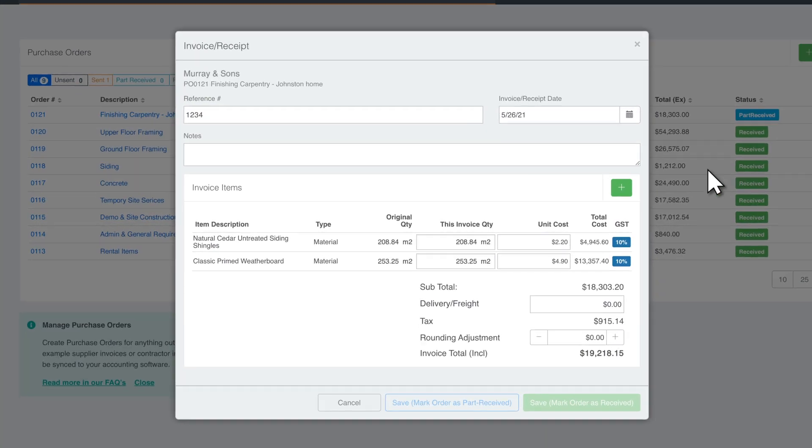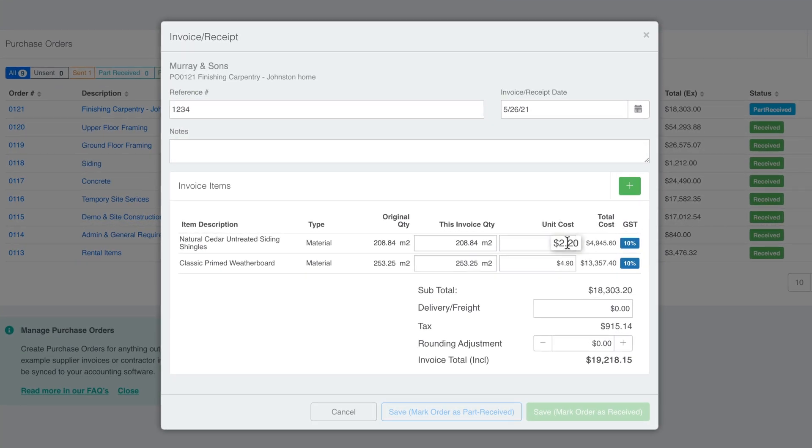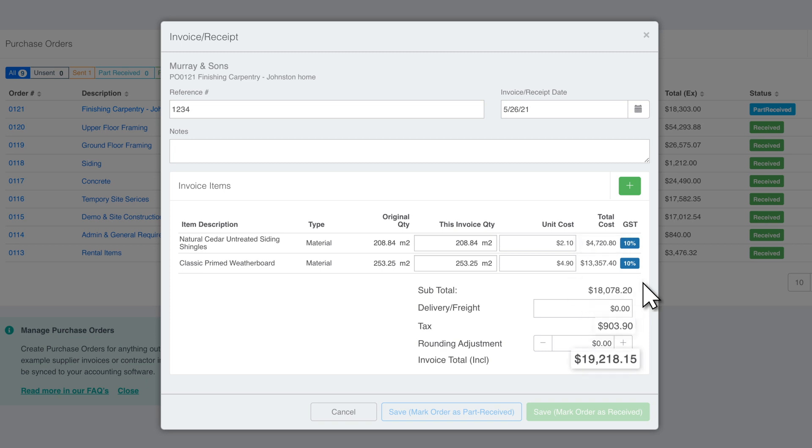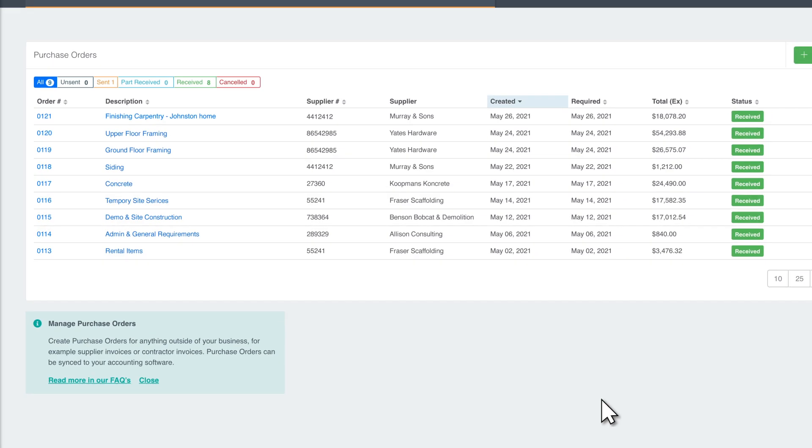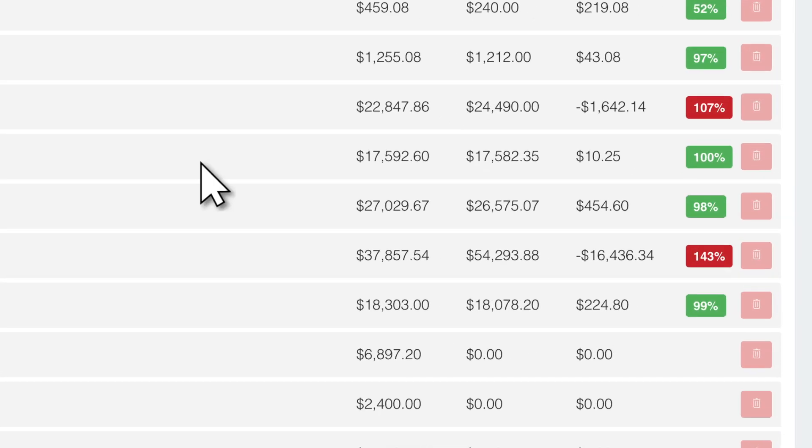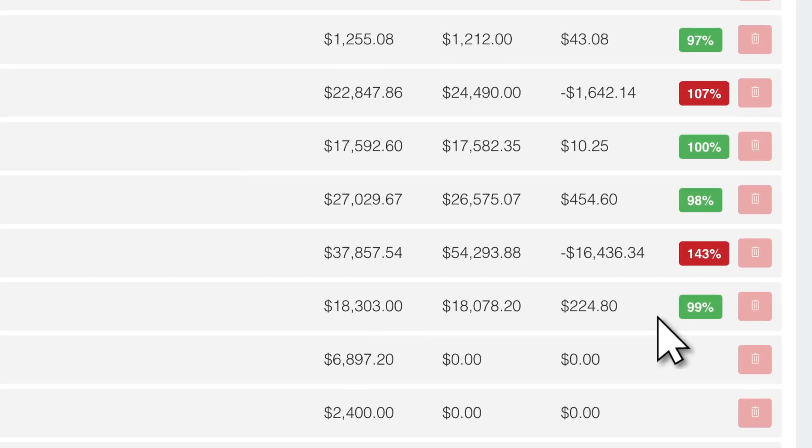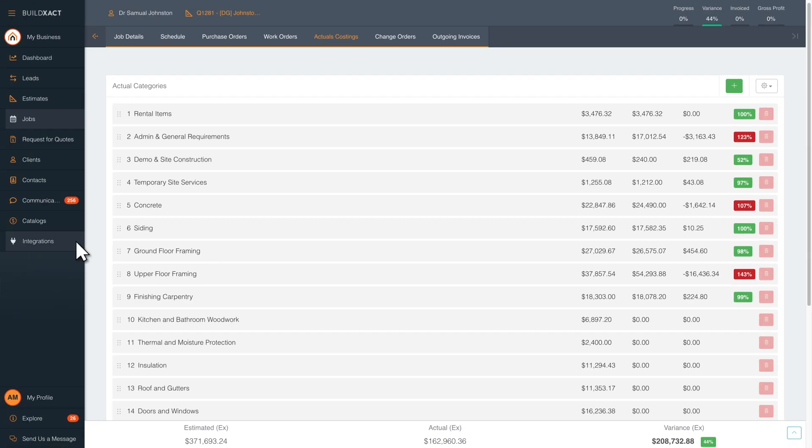Once you've received the supplies or the task has been completed, create a receipt for the order. Track your costs on your project as they are happening in real time. You can see exactly how you've tracked on the line items in comparison to estimated costs.